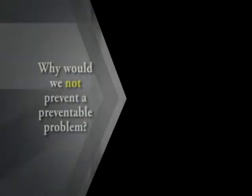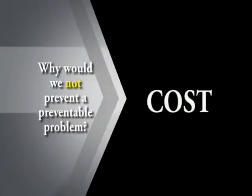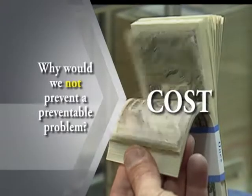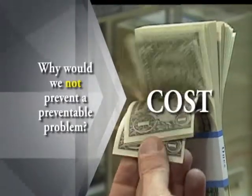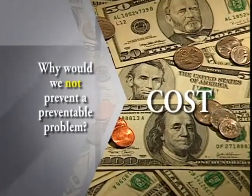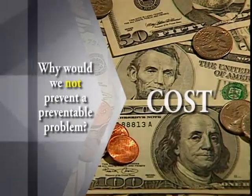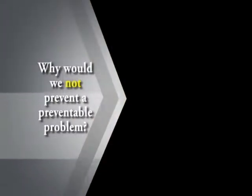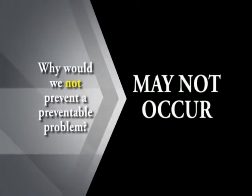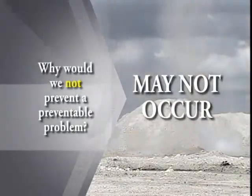Why would we choose not to prevent a preventable problem? Cost — it may cost more to prevent it than to fix it. So we accept some risk from a cost standpoint and choose not to prevent it, but we've got our first indicator so we can nip it in the bud at less cost. Another reason: the likelihood of it occurring may already be so remote that even if we do nothing, it still might not happen.